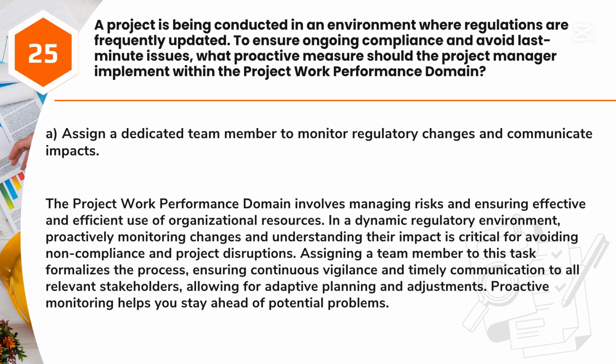Answer: A. Assign a dedicated team member to monitor regulatory changes and communicate impacts. The project work performance domain involves managing risks and ensuring effective and efficient use of organizational resources. In a dynamic regulatory environment, proactively monitoring changes and understanding their impact is critical for avoiding non-compliance and project disruptions. Assigning a team member to this task formalizes the process, ensuring continuous vigilance and timely communication to all relevant stakeholders, allowing for adaptive planning and adjustments. Proactive monitoring helps you stay ahead of potential problems.